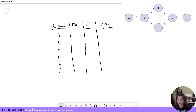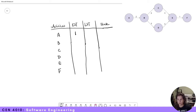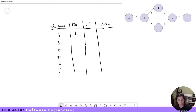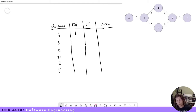The earliest start time for A is day one of the project. Now let's move down to B. The earliest start time for B is three, and that's because the earliest start time for A is one, and it takes two days to complete the A-to-B task, so the earliest start time for B would be three — after those tasks are complete.